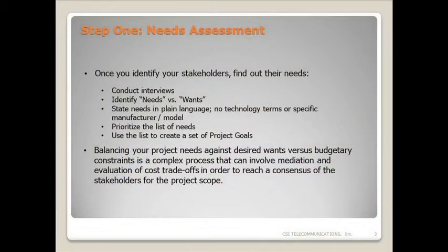So the first step that you engage in is the needs assessment. The needs assessment is really going to become the foundation of your project through the very end, when you do acceptance testing and determine whether or not this has been successful. Because it's all going to be based on what did they want, and is the final product delivering to their expectations?